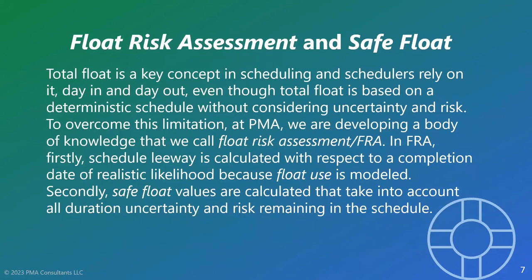In particular, you're not modeling float use, the risk of using float when you do your simulations. And what are the consequences of that? You are missing the opportunity to get more than just one p-value curve, and you are missing the chance to calculate a counterpart to total float that would be very helpful for your schedules when you go back to managing your normal schedule.